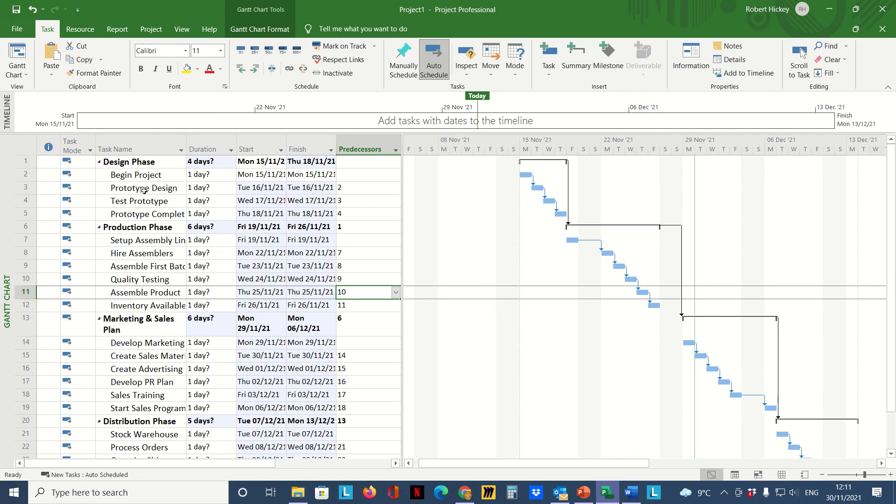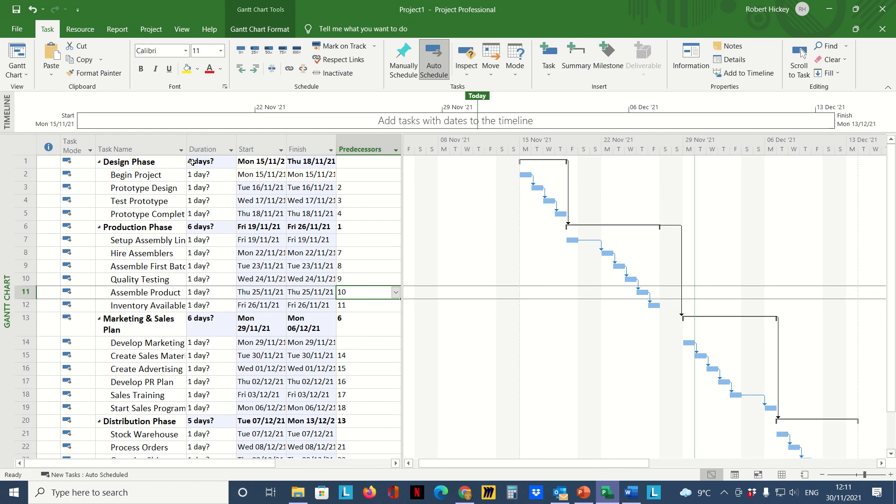We can see something else has happened here. We know that by default, because there are auto-scheduled tasks, a one-day duration has been just inserted there, but that's only a temporary placeholder. But now we can see that our summary tasks have now changed in duration. That's because at no stage will I ever type in a duration into the summary task. The summary task duration is simply an accumulation of all of the durations, the collective durations of the subtasks underneath.